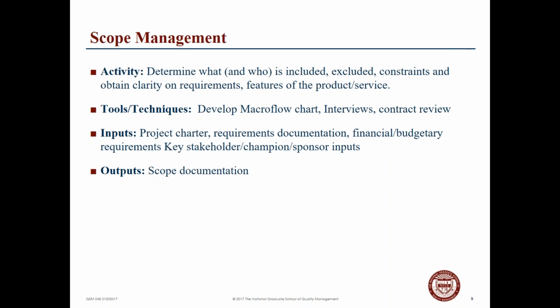Yeah, that's a challenge. You didn't have a contract with that vendor for stable pricing then, huh? No, I don't think it was stable pricing, or fixed pricing. Once they found out that we were trying to assess this product again, they raised the price about 300%. A bag that cost, I think, $8,000, now they were wanting $35,000 for it. Yeah, they saw opportunity.